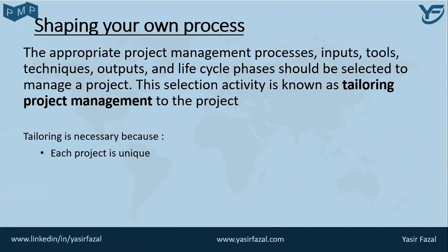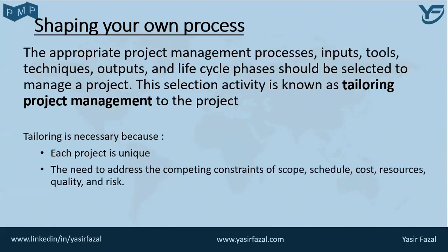Tailoring should address the complete constraints of schedule, scope, cost, resources, quality, and risk. The importance of each constraint is different for each project, and the project manager tailors the approach for managing these constraints based on the project environment, organizational culture, stakeholder needs, and other variables.